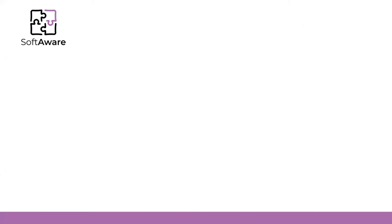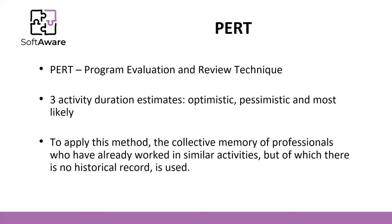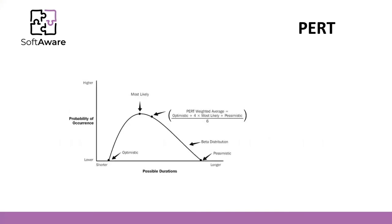Another technique is PERT — Program Evaluation and Review Technique. Three activity duration estimations are made: optimistic, pessimistic, and most likely. You then apply the PERT weighted average formula: (optimistic + 4 × most likely + pessimistic) ÷ 6. This value represents the effort estimation for one work package, and we estimate work package by work package.